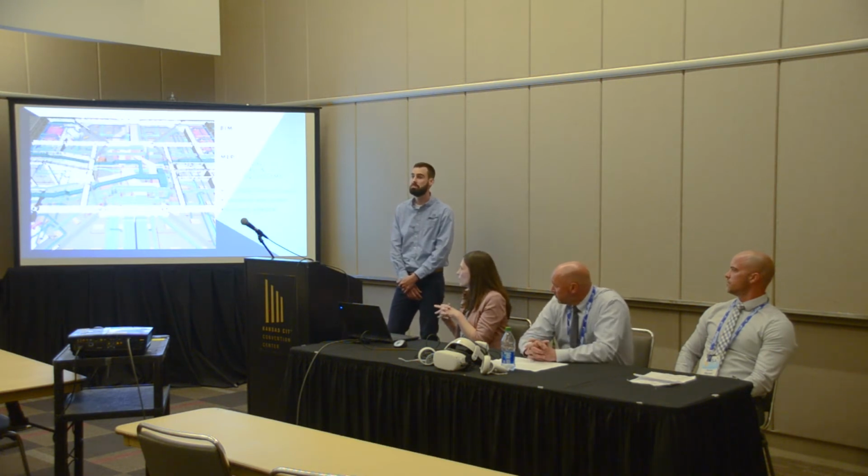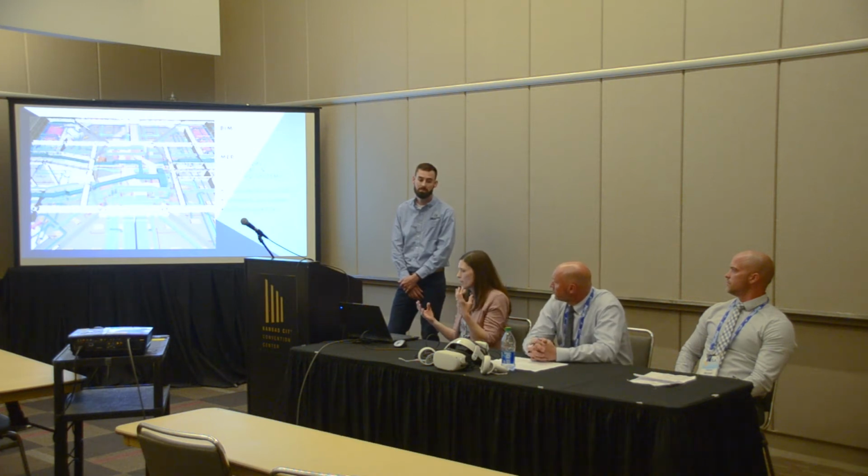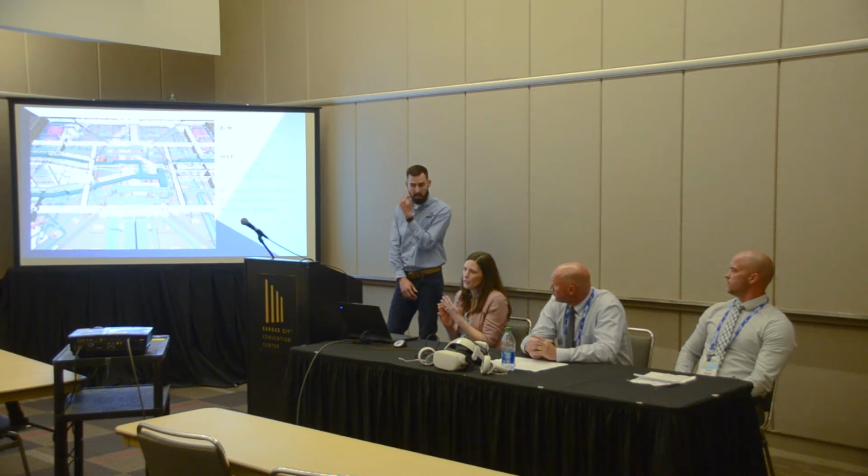So we go through and we figure out where everybody needs to be, who's going on the top, who's going on the left, who's going over and who's going under. And it really gives us a lot of advantages when it comes time to build. We know what we need, we know the lengths of the things that we're gonna fit in the building, we know what order we're going in.